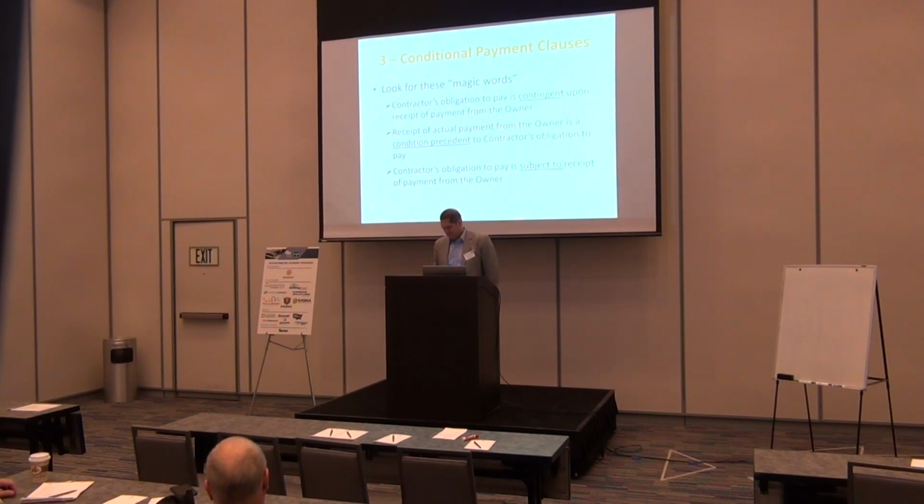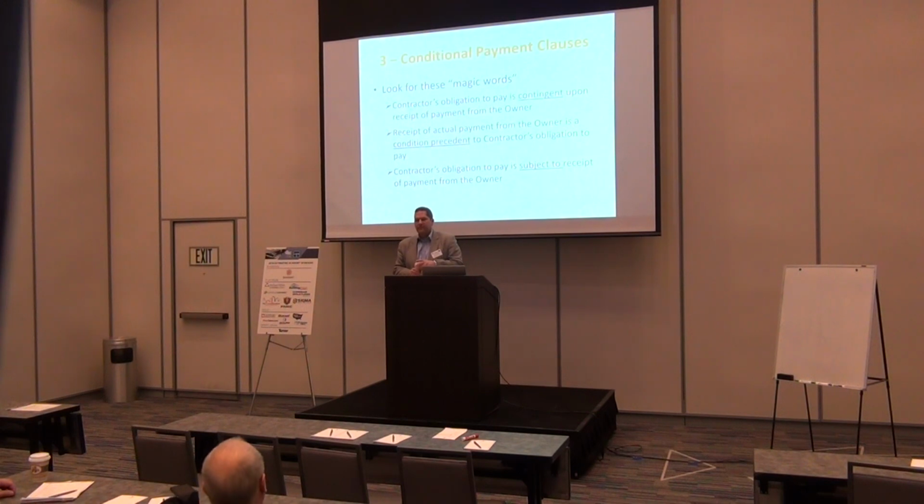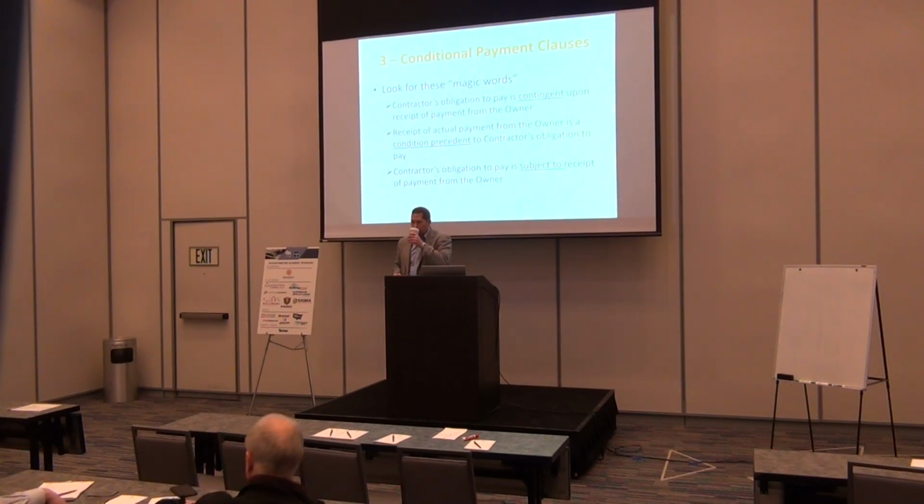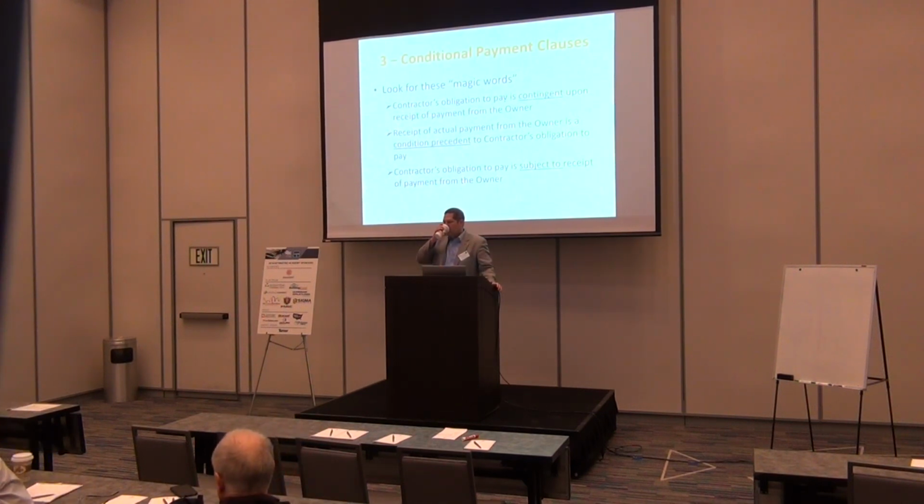If you sign a contract that's, for all intents and purposes, a pay if paid, do you forfeit your lien rights then? No. Both Missouri and Kansas have specific statutes that allow you to pursue a mechanics lien, even if there's a pay if paid. It's very typical that I see both in the contract. One is they will pay us when they get paid, but only will pay us if they get paid. I haven't seen a contract lately that doesn't have both of them.